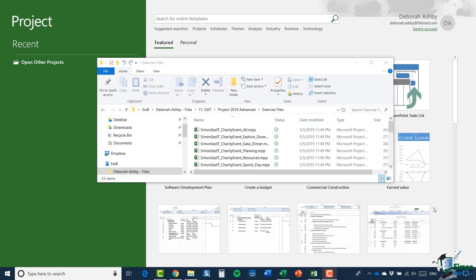If in fact your requirements are more complex, so for instance, if you have a number of pools of resources, and sometimes you need to get resources from one place and sometimes from another, maybe lots of different projects and programs and consolidations and so on, then Microsoft Project isn't really going to cope with it without you being extremely careful. And even then you'd be working in an environment where a relatively small slip or deviation from the rules might cause a problem.